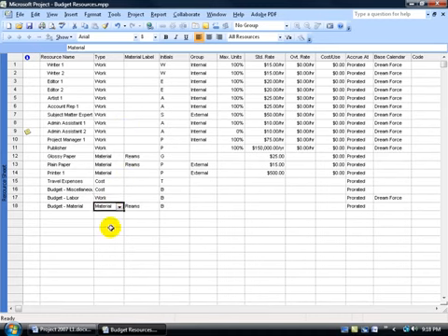And it's the same for materials, except materials is going to be in units. Think of it this way. If I have a total of 5 reams of glossy paper assigned to any one of my tasks within the project, and another 5 for plain paper, and then I just have one printer, what are the total units that I've assigned for my materials collectively within my project? 5 plus 5 plus 1 is 11 units. So what you're saying here is you're budgeting 11 units, or 11 materials, aside.